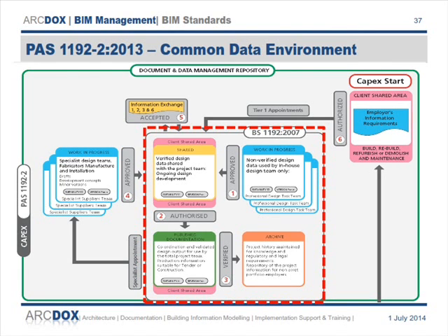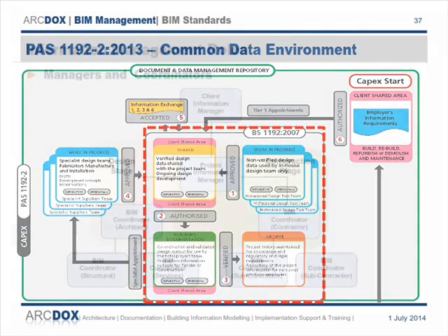So somewhere in the project, in the team, this has to be set up. There has to be a structure set up for sharing information in this way. Where that lives, who hosts it, has to be agreed among the team. It will usually depend on who's responsible for information management. In some cases, it'll be the contractor providing this. Some cases, it might be the architect. Some cases, it might be the client who will host this information in a way that people can share it.